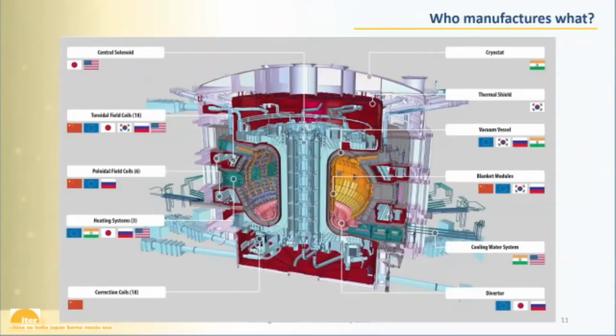ITER does not work by just receiving a check or money from our partners onto our bank account and then we go and sign the contracts with the company. No, somebody a long time ago thought of a very clever idea to build ITER in a very unique way, which is called in-kind procurement. So we split up the ITER machine like a birthday cake, and all the partners could choose which technology they want to contribute to ITER. It was a system giving credit points for different contributions.